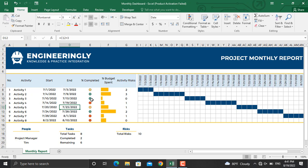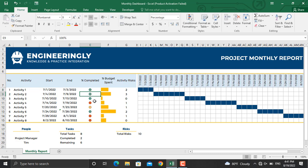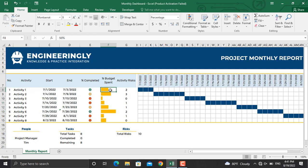We also have traffic light signals which show the percentage completed of each activity. If the percentage completed is about 75%, it will be shown in green — for example, 80%. If it's below 75%, for example 70%, it will be shown in yellow. If it's below 50%, for example 45%, it will be shown in red. For the percentage of budget spent, let's make it 90% — you can see the data bars will be updated as well.